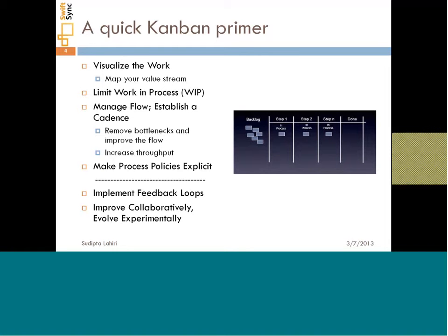So for example, if you have a ready for development lane or a ready for testing lane, there should be a policy that states what is ready for development. When can a card be said to be ready for development? Is it ready for development when the UI is available? Is it ready for development when the detailed spec is available? Is it ready for development when the acceptance test cases are available?